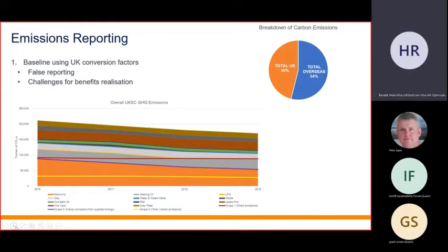So the good news is that we hope all UK StratCom sites will have an EMP, an estate management plan, by the end of Epoch 1, and the funding to be able to get after the things identified in the EMPs and the renewable energy surveys is coming in Epoch 2. But I think, like everyone, we are very much recognising that there isn't the funding to solve every problem, and the pace of delivery will remain a challenge throughout. So we're very much having to look at a prioritised approach. And it's not just prioritising, obviously, within our estates and our land parcels, it's prioritising as a whole. So looking perhaps thematically, things like addressing SLA demand, addressing solar, rather than looking to individual programmes and having a piecemeal approach.